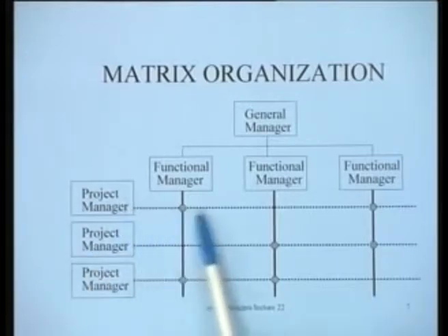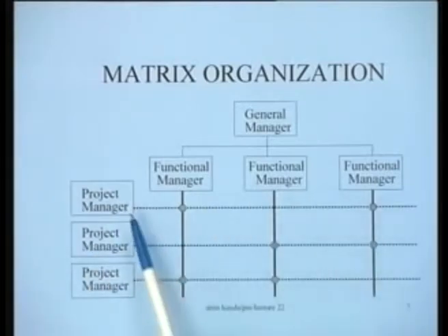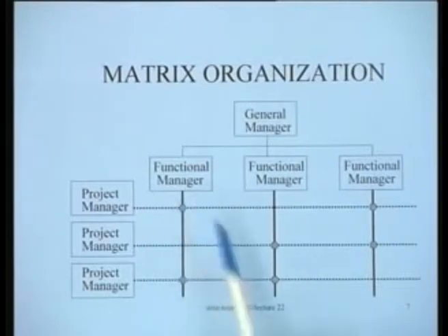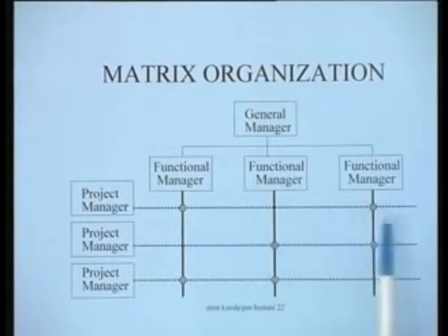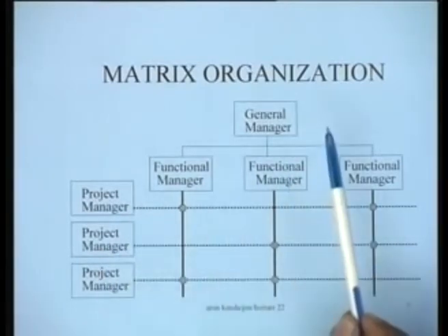So, the major advantage of this is that the organization can do a number of projects together and can retain the functional structure of the organization, but depending upon the needs of the project certain individuals could be picked up and you could form a project team. And once the project is over, these people go back to their parent departments as they are, and then they could be picked up for the next project and so on. So, really speaking, this gives you this kind of flexibility.